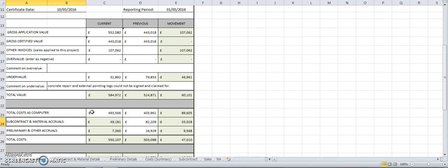The cost report is run in a way whereby the costs that have made it onto the cost ledger for the month may not be the current costs that the contract has conceded or has had borne to date. Hence the terminology accrual. An accrual is where costs are borne but are not yet shown on the cost report, and this is the key skill of a quantity surveyor.